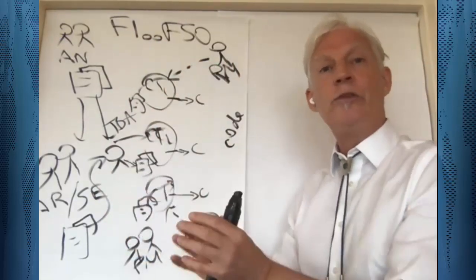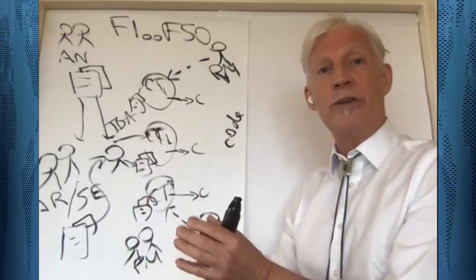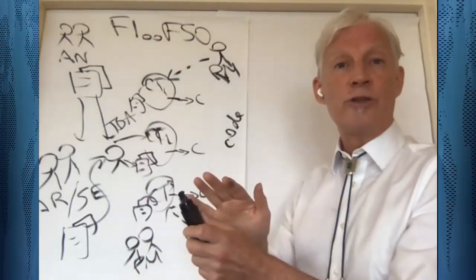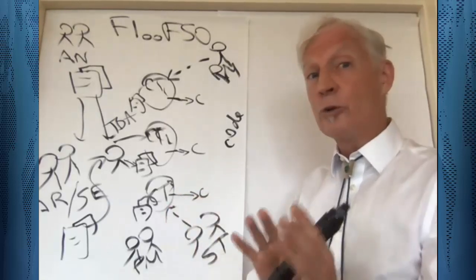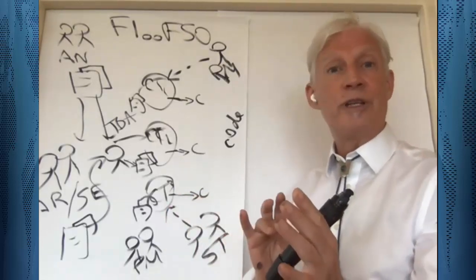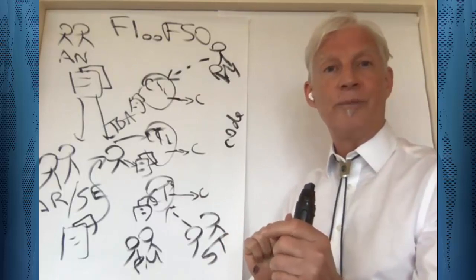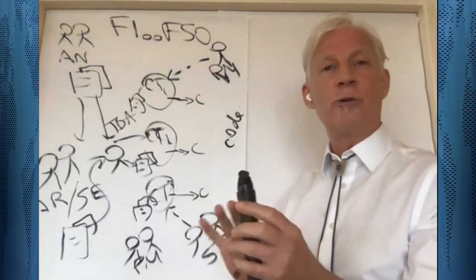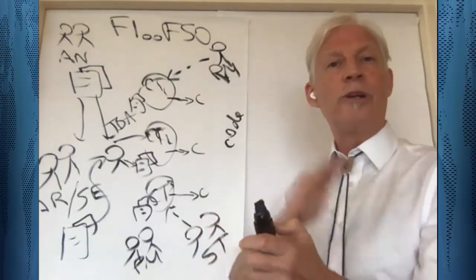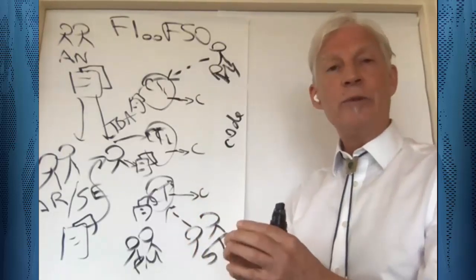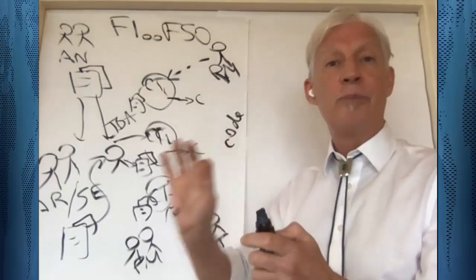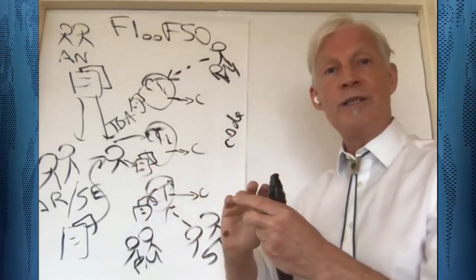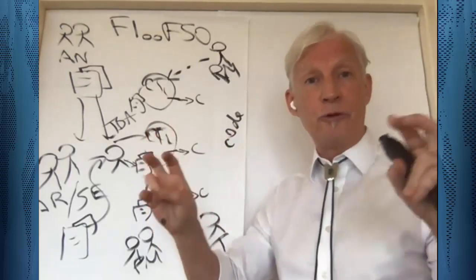And this team is not only cross-component, not only cross-functional, and sometimes groups that are introduced to Scrum incorrectly are told that a team in Scrum is cross-functional. Now, the reason I say that's incorrect is that it's not wrong, but it's only half of the story. A team in Scrum is cross-functional, comma, and cross-component, meaning that that one team is what's sometimes called full stack.